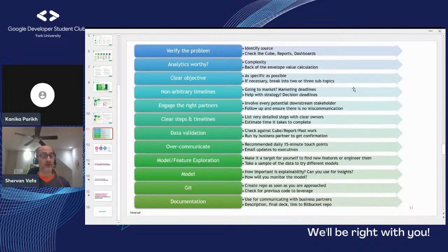Right? Sometimes you need to support a campaign, a marketing campaign. When it comes to that, you have very little room for negotiations. Like, you want this by a certain time, so you have to get it done by then, right? Sometimes it's an AI solution or a machine learning, like an NLP solution that's ingested into a software. Software release cycles are typically 3 times a year, right? And from the beginning of the year you know exactly what that date is. So you got to work backwards from that date. Say, okay, if this is my timeline, then realistically, this is what I can achieve. But you need to know what those timelines are, right? Really, really important.